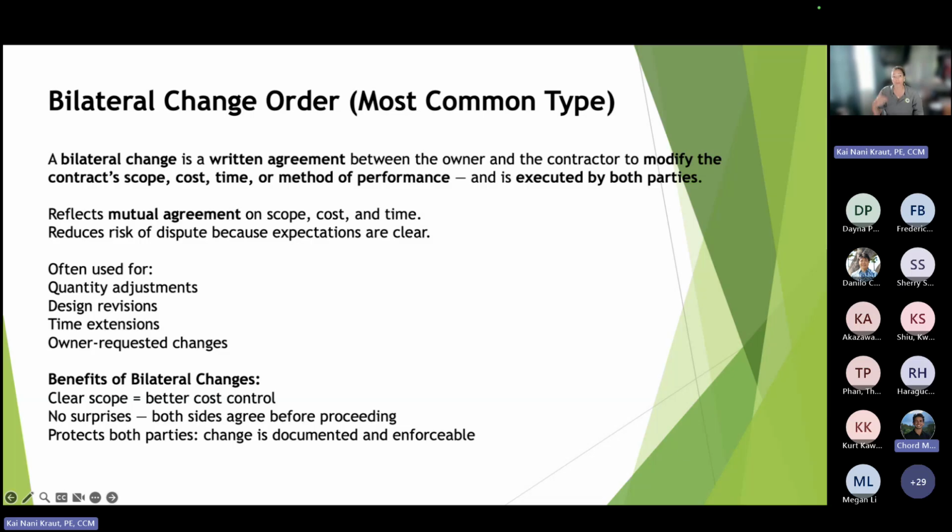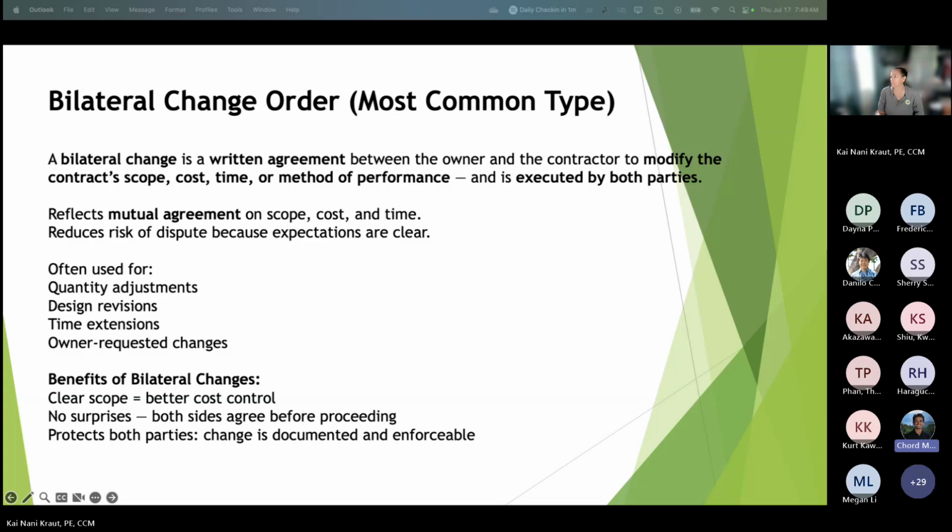Okay, so we're going to go into... One second. Yes. One second, sorry. So in the chat, thank you, Chan, and thank you, Andy. They specified that the definition says no designation of calendar or working day. It shall mean calendar day. Thank you. Yep. I knew it was in there somewhere. Great question. Remind me, Cord, let's add it in here to make sure that's clear.